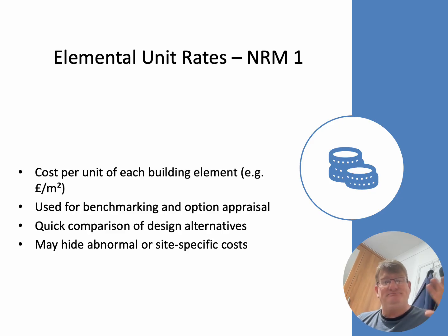So again, it sort of allows for a comparison between different designs or different building methodologies that you may wish to promote. Okay, that's the beauty of it. All right, but its accuracy is quite medium, and again, you would probably do it at phase 2 or 3 along the RIBA plan of works.